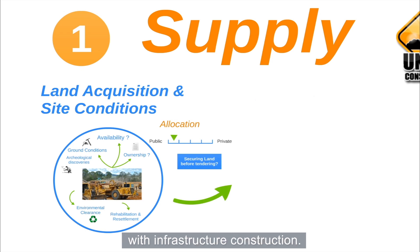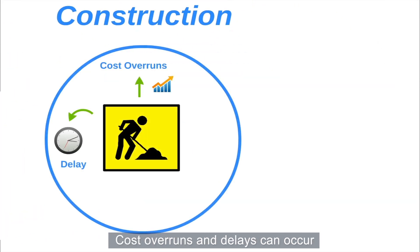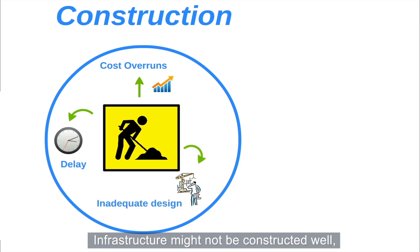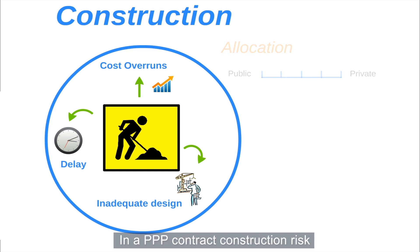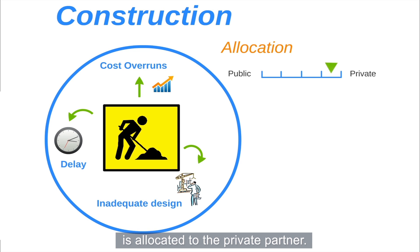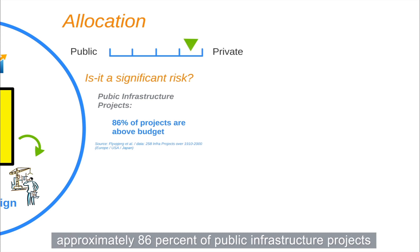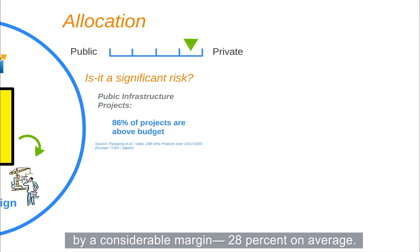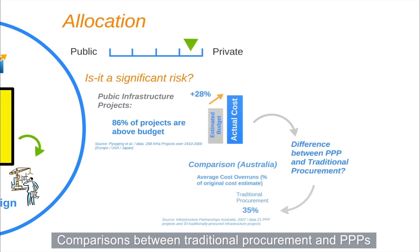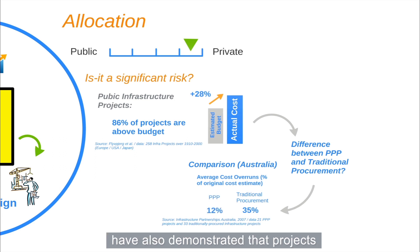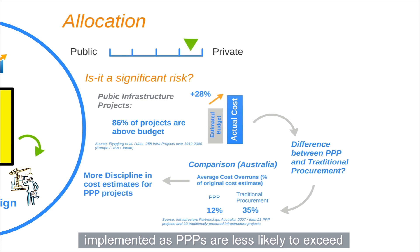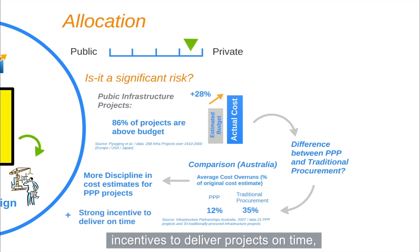Another type of risk is associated with infrastructure construction. Cost overruns and delays can occur during the construction phase, and infrastructure might not be constructed well or might not deliver the service required. In a PPP contract, construction risk is allocated to private partners. Studies based on a large pool of cross-country infrastructure projects have shown that approximately 86% of public infrastructure projects exceed their initial budgets by a considerable margin — 28% on average. Comparisons have also demonstrated that PPP projects are less likely to exceed their initial budget than those following traditional procurement, and PPPs present stronger incentives to deliver projects on time, as the private sector is not remunerated until construction is complete.